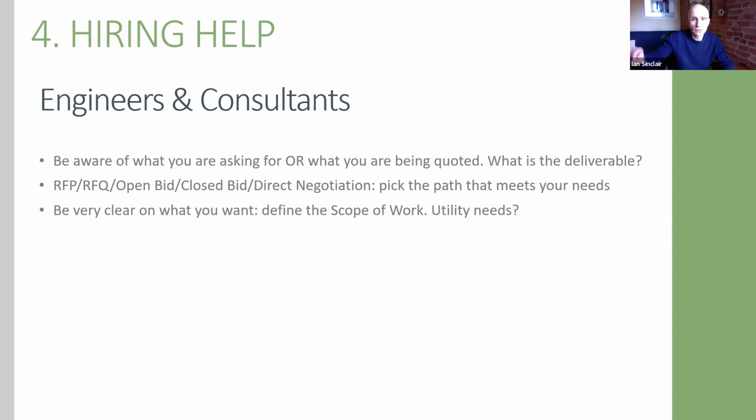And again, going out and hiring some of these resources: the solar thermal industry, for example, is littered with poorly performing assets. Why? Because the procurement process of that organization, particularly in the public sector, required them to go with traditional mechanical design consultants, as opposed to going to a specialist solar thermal design-build contractor, because frankly, a lot of mechanical consultants have very little experience with solar thermal, and that's how things go wrong.